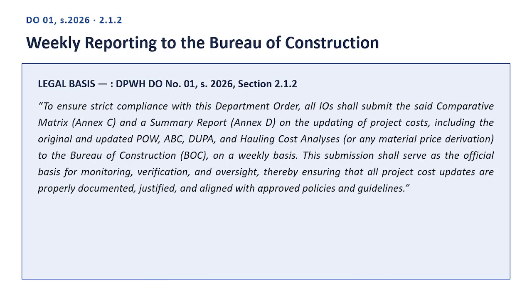Here is the legal basis, quoting directly from DPWH Department Order Number 01, Series 2026, Section 2.1.2. Quote. To ensure strict compliance with this department order, all IOs shall submit the said comparative matrix, Annex C, and a summary report, Annex D, on the updating of project costs, including the original and updated POW, ABC, DUPA, and hauling cost analyses, or any material price derivation, to the Bureau of Construction, BOC, on a weekly basis.